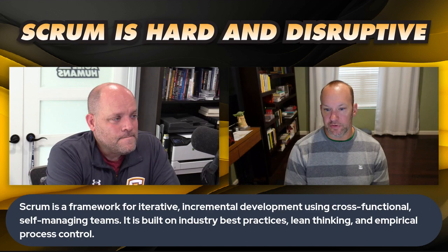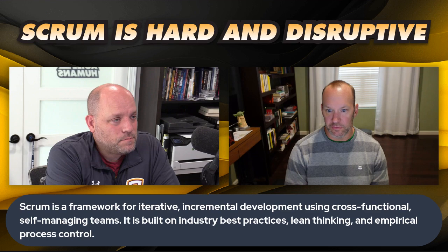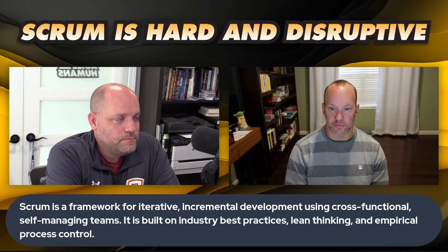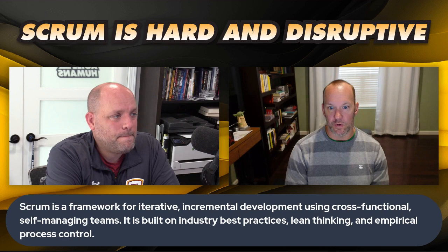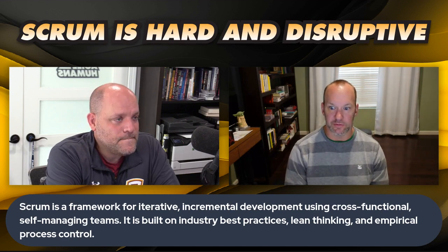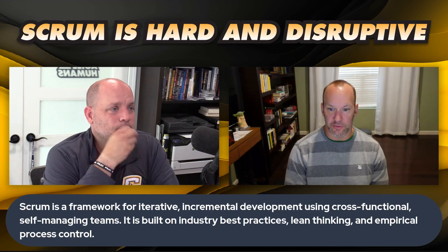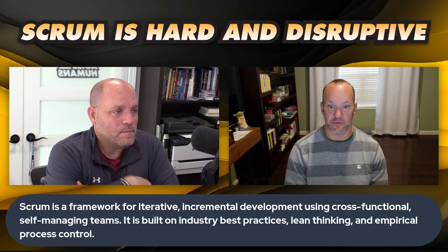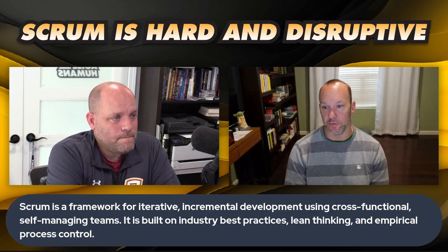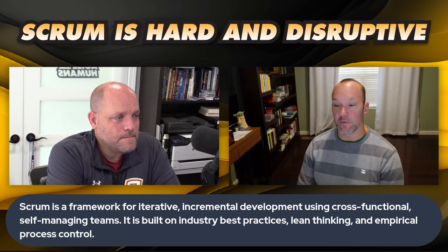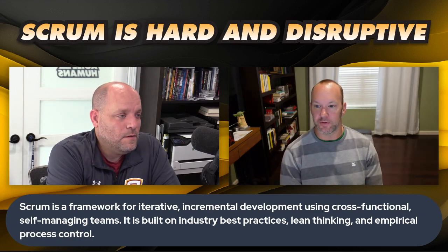Yeah, what's interesting about this whole thing is how much there is to talk about in 2 sentences. Starting from iterative incremental development, right? So iterative to me, we have this short window. We have sprints, 1 month or less. Incremental meaning we get to something that's done at the end of every iterative cycle, right? So iterative and incremental, I think, being 2 key cogs of the foundation of what Scrum is. I view iterative as the sprint and incremental as the increment. Do you view it any different than that?